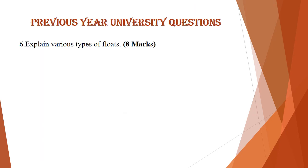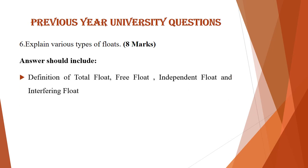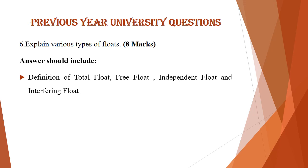The sixth question was: explain various types of floats, which carries 8 marks. There are four different types of floats: total float, free float, independent float, and interfering float. Your answer should include the definition and a brief explanation of each of these four types of floats.